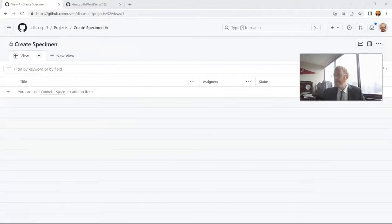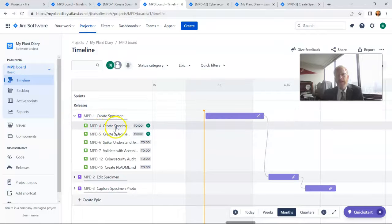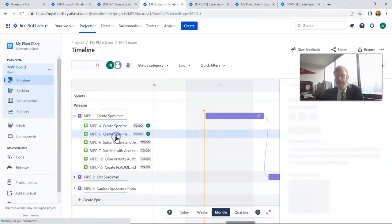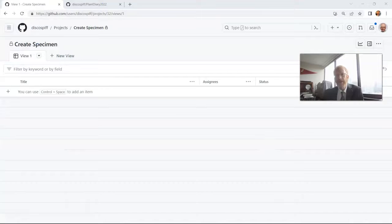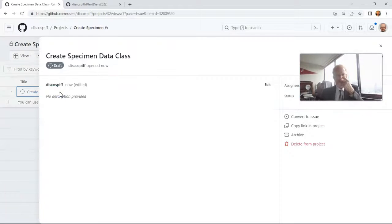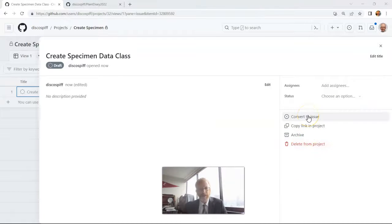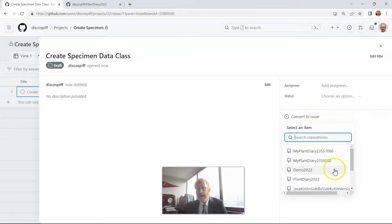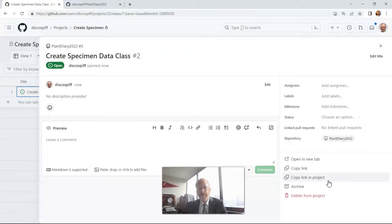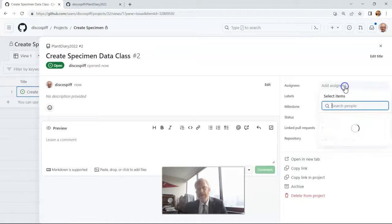To give a point of reference, I'm going to model this off of a similar project I set up in JIRA with 'create specimen' as an epic and several technical tasks underneath it — 'create specimen data class,' 'create specimen UI screen,' and so on. So this is our create specimen epic, and we simply hit the plus here and say 'create specimen data class.' There's a place for assignees and the like. When we create it, I'm going to go ahead and say 'convert to issue' and pick a repository for the issue to be in. That gives me options like the ability to set it to To-Do, give it a milestone, and assign it.